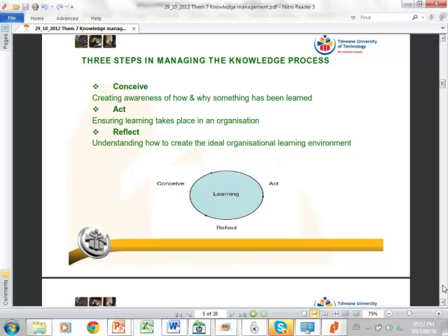How do we reflect? What questions do we ask? What went wrong? Okay, and? What went well and what can be improved? Yeah, okay. So we ask what went well because we're hoping that things happened that went well, that were innovative and a new way of doing things, and that actually worked. So we don't want to forget that we did something well and it actually worked. And we also ask what went wrong, because we want to find out, is it the process, is it the people, is it the procedure, what is it that is not working for us?